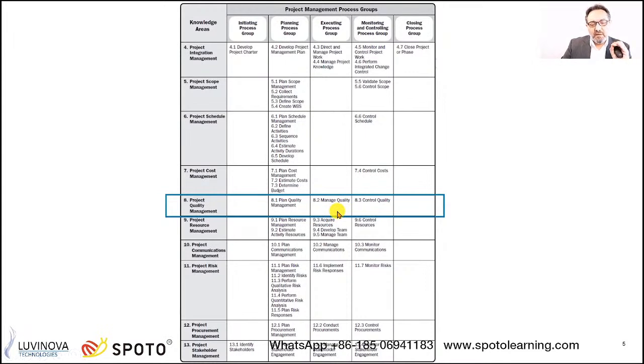Understanding the framework is one of the core concepts about quality in this framework from PMI. Manage quality is the heart of the quality in this framework. This is where you need to receive the measurements from control quality, all the outputs from the inspections about your deliverables. They are going to be analyzed at the manage quality level, to see how we can improve our work to avoid having these defects in our deliverables. So manage quality focuses on the quality of our work, whereas control quality focuses on the quality of the deliverables. And here we have a link between quality and scope.